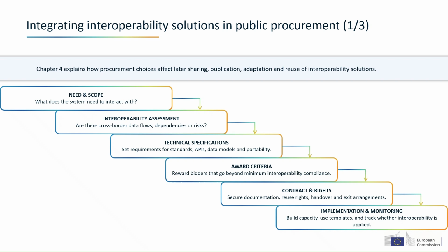Then, it considers whether an interoperability assessment is needed, especially where the procurement may affect cross-border digital public services. The results of that early analysis should not remain abstract. They should feed directly into the technical specifications. That means standards, APIs, data models, semantic mappings, and portability requirements.